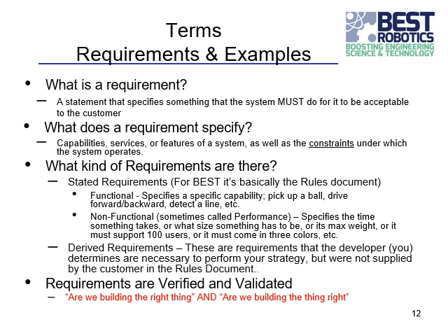And then you, as the developer doing this design, may have some additional requirements that the rules document doesn't tell you need to do, but because of the strategy you have, they're things that you would need to do. So an example of a derived requirement would be: we're not going to do everything in the rules document, we're going to focus on a subset of the scoring.